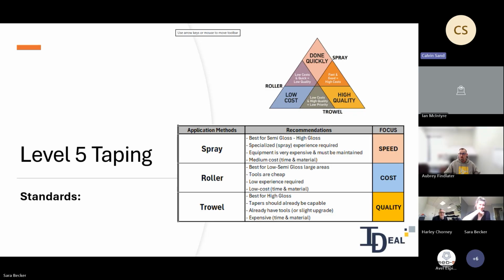Well, I'd agree with the trowel on, like when we were in an area with a lot of glass, sunlight coming in, the trowel on seemed to be the best coverage. The roll on, obviously, like you said, was quicker and less expensive. And then the spray, we just found that a lot of product, and maybe even a little more mess, right? For sure.